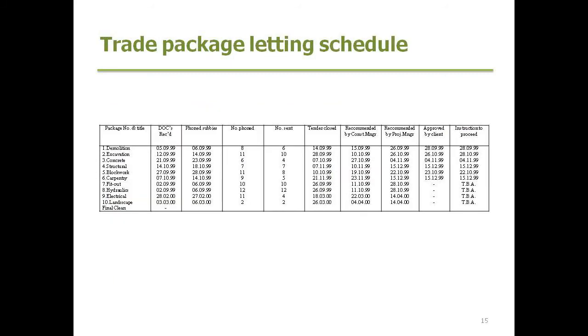Keeping a record of trade packages in a construction management style project is extremely important as well, and this will be the basis for identifying where we're going with the project. As in the previous two slides, where we had the variation schedule and also the construction time program, this is another important schedule to see where we are in the project progress, whether we're going to hit that estimated final contract price, and how each of the three will relate to each other.